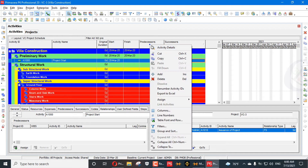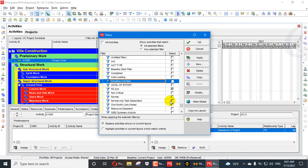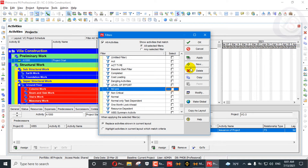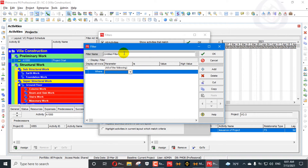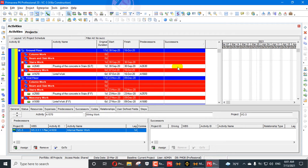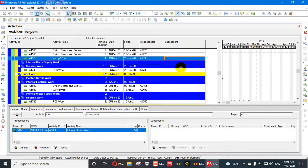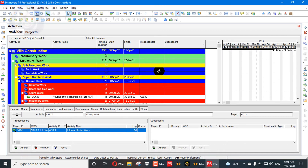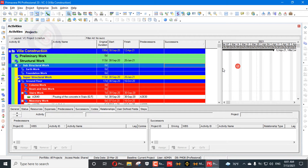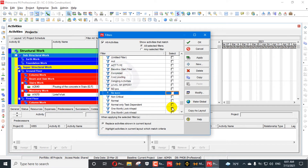We can also see this in the log. We will also create a new filter for activities having no successor. You can see the activities having no successor — these are 31 activities — which is the same result appearing in the log. This is the other method to find out activities without any relationship.